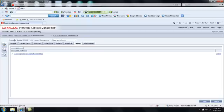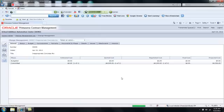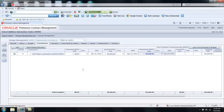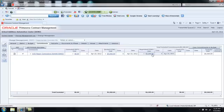Once I've documented that quote, I'm going to save, and I'm going to return back to change management. And go to the commitments tab. So for Ace Mason, I can see now we've advanced from the RFP through the quoted phase through the negotiated phase. At this point, if Ace Mason agrees to the $4,300, I'm now ready to go to the owner and pose the possible change to the owner.